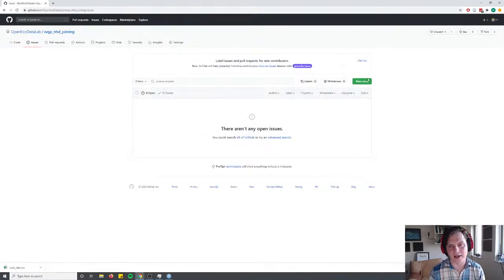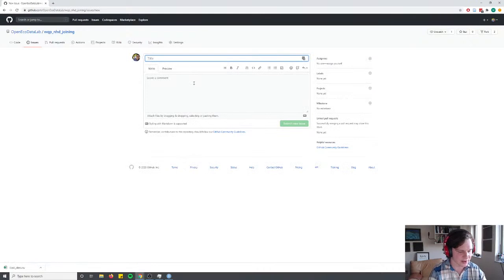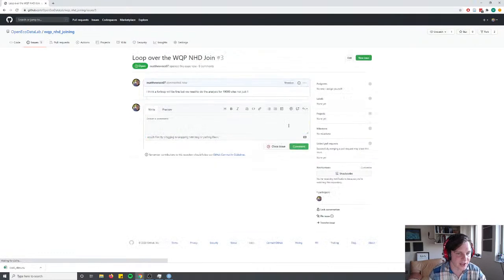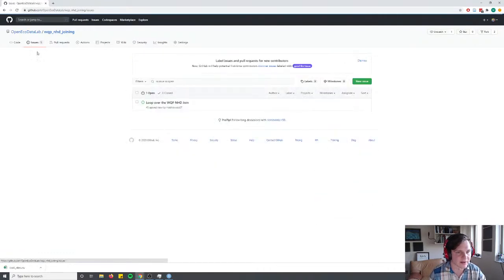So let's say I want to do something in the future and it's just not working yet. Earlier I mentioned that I want to loop over the water quality portal NHD join. And then I can just say, I think a for loop will be fine, but we need to do the analysis for 1,000 sites, or really it's like 19,000 sites, not just one. So here I'm just identifying an issue, and this is something that needs to be changed and improved. Now if we go back to the main issues page, you can keep track of a bunch of these, and they can be things that are broken or things that are future analysis. And it's a really clean, easy way to track it.